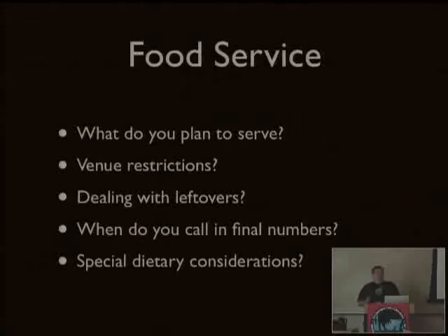And they'll say, if your event starts on a Friday, we need to have your final numbers, say, the Tuesday before. And that's the point where you're going to have to say, okay, this is how many registrations we have. This is how many we think we're going to get in the next few days. This is our final number. And then your food service will bring enough food for that number of people. And they will charge you for that number of people, regardless of how many people actually show up to your event. So talk to your food service, find out when they need the final numbers.